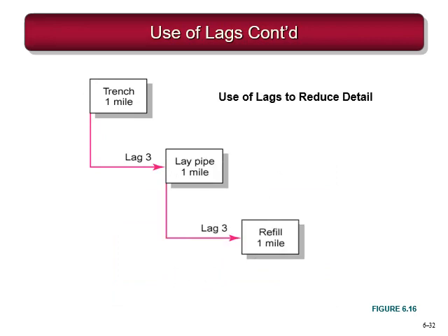So over here we see a lag of 3 days between start to start. After you start digging the trenches, you have to give a lag of 3 days before you start laying down the pipes. So the basic concept is, maybe you will be doing part of the trench, the digging part, for 3 days, and then you'll start laying the pipes. And after you're done with the pipes for 3 days, maybe you can start refilling those trenches. Okay, so this is the basic concept.